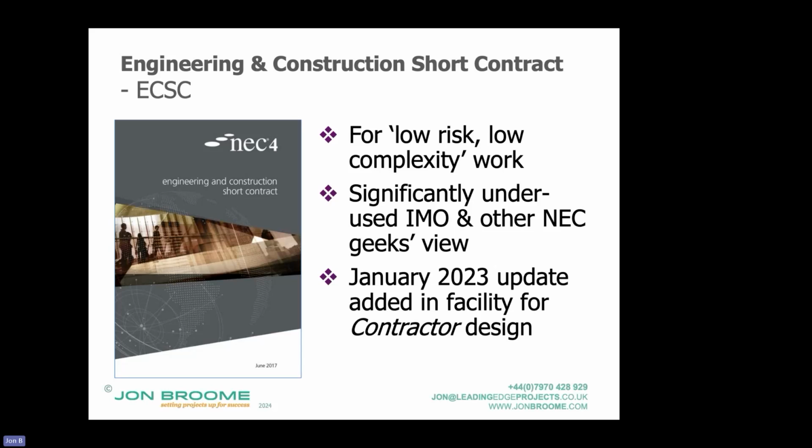One of the things I quickly sussed out was that people who do attic conversions are basically design and build contractors. And therefore, in its unamended form, I couldn't use the short form on that basis. Whereas with the January 2023 version, I could. It does allow for that.